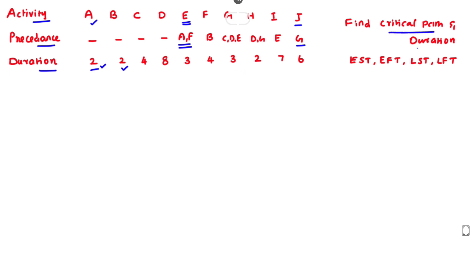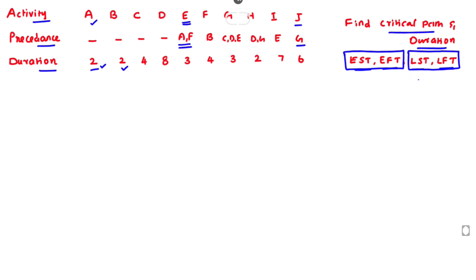We have to find the critical path and project duration, then EST (Early Start Time), EFT (Early Finish Time), LST (Late Start Time), and LFT (Late Finish Time). These tell us the earliest we can start and finish an activity, and how many days we can delay the start or finish of an activity. First, we draw the network, identify the different paths, and then finalize the critical path.